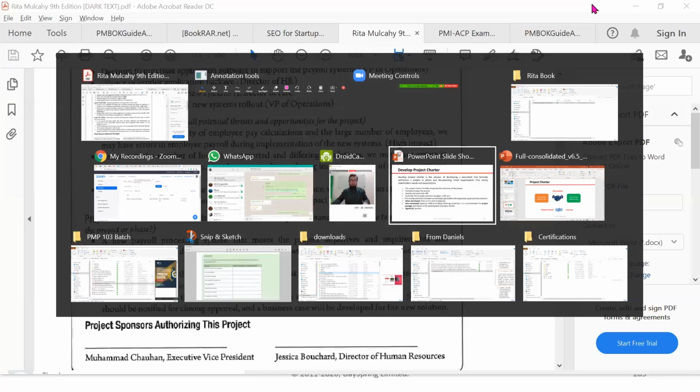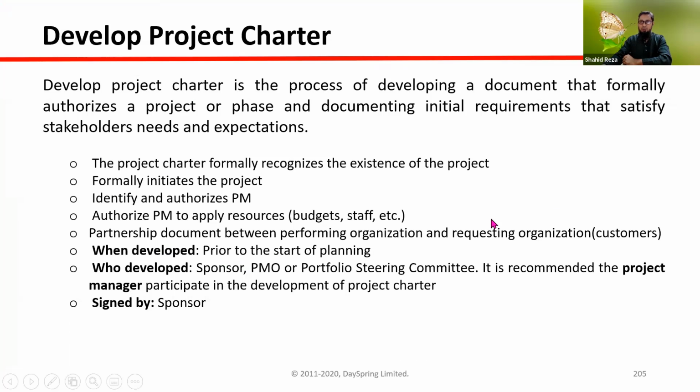Now let me go back to our presentation slide. Any question about the project charter? What will be the content of the project charter? As per the PMBOK, the project charter is a mandatory required document. Before starting, the project charter should be signed off by the sponsor. Otherwise, as per the PMI guideline, PMBOK guideline, you cannot start the project. So what is happening in the project charter? Number one, officially the project is chartered in the organization. That's why its name is project charter. Chartered means authorized in the organization. And second point is the project manager is formally assigned to run the project here.